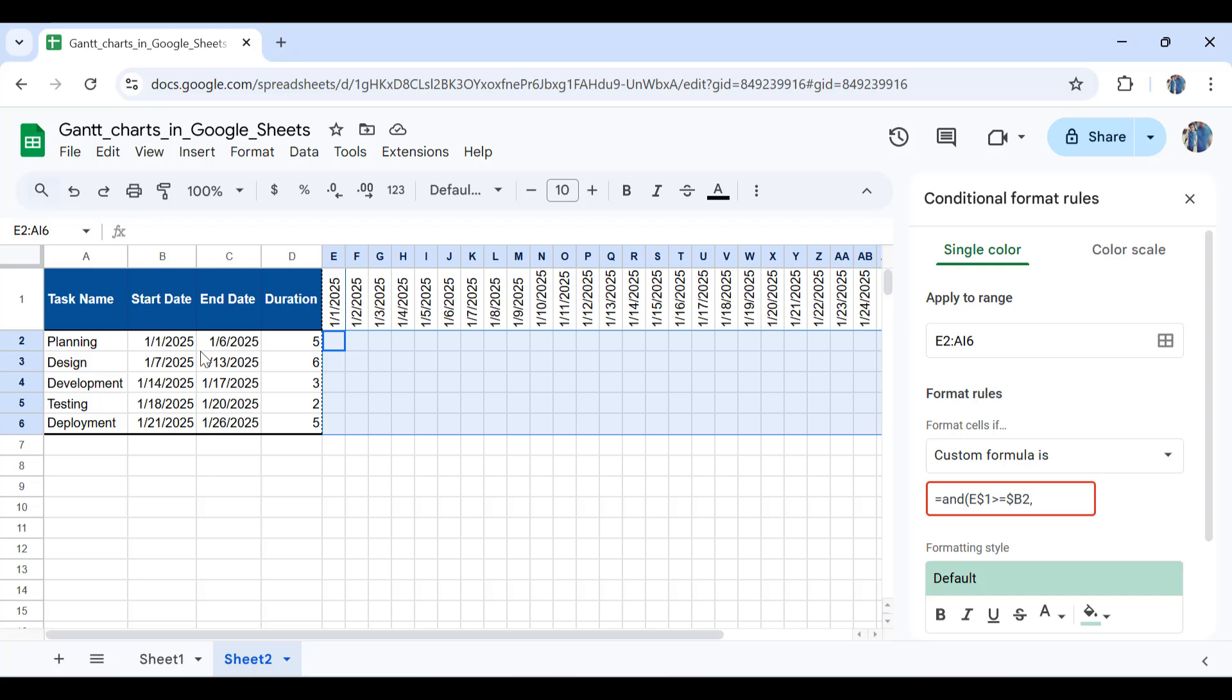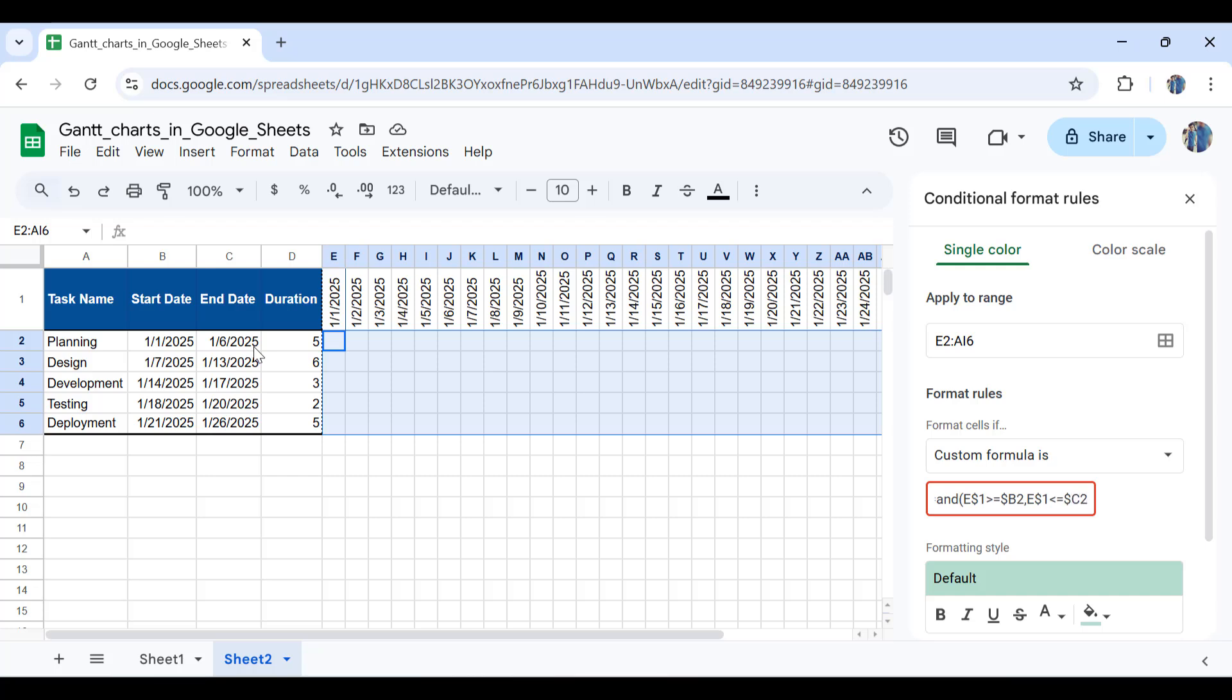Since this is B2, the next condition should be if the same date is smaller or equal to the end date. I'll write E dollar sign 1 smaller or equal to the end date, which is in cell C2. Again, for cell C2, we need to lock the column by putting the dollar sign before the column name and leave the row name free. I'll write dollar sign C and then 2. Close the parentheses, and as you can see, it's already showing our Gantt chart.